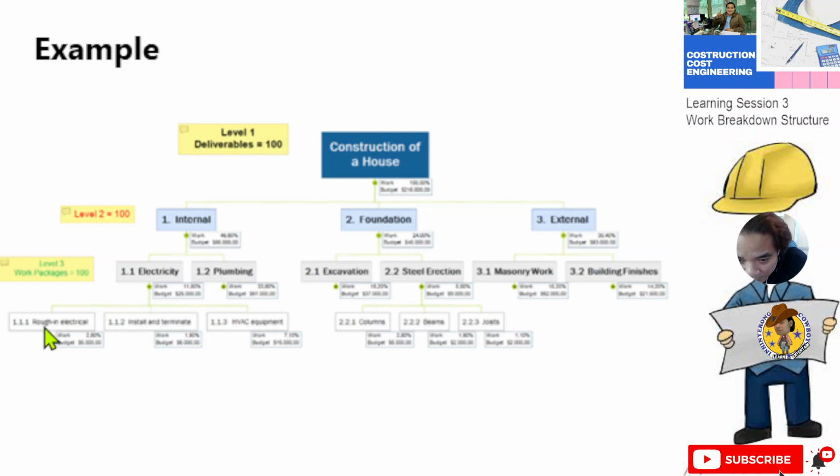Then this is the subtask for that one. Okay, so this is the WBS. Meaning, in this example, this is 5 million. This 5 million is being subdivided into these three subtasks. Example, this is 1, 2, 2, so 1 million, 2 million, and 2 million. Then that 1 million is divided also for this one. So you can see the allocation of cost for a project.